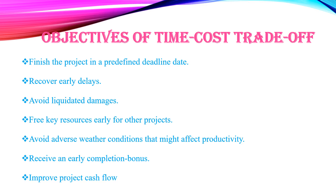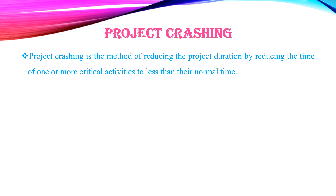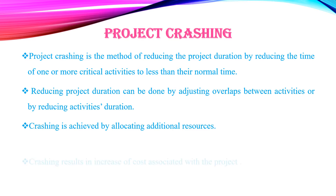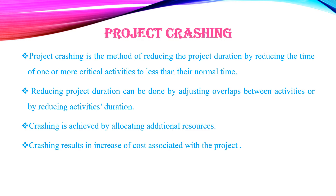Project crashing is the method of reducing the project duration by reducing the time of one or more critical activities to less than their normal time. Reducing project duration can be done by adjusting overlaps between activities or by reducing activity durations. Crashing is achieved by allocating additional resources and results in an increase of cost associated with the project.